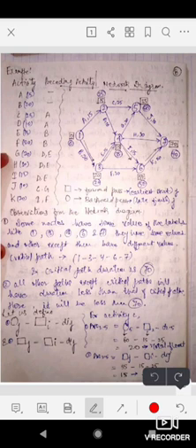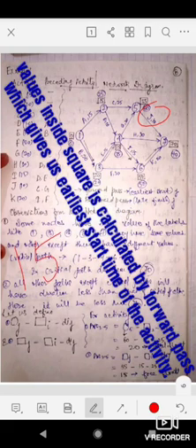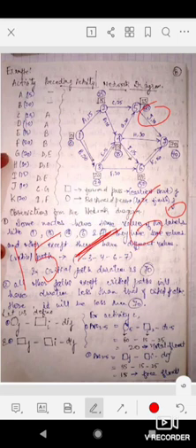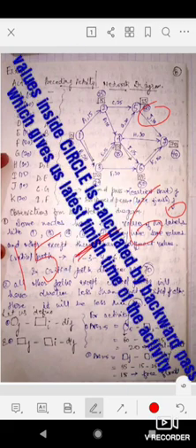Activity C can be started after 15 days, because after 15 days A will be finished. And you also know that the time inside the circle tells us the maximum time for the completion of that activity. So you can start activity C at 15 days and you have time till 60 days. But activity C takes only 25 days.